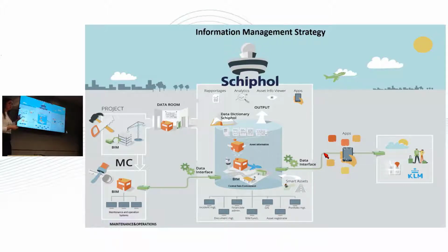And they are responsible for processing all of the information conform our data dictionary, where we have all of our data requirements, and they will send it to us through a data interface, and it will then land in our central data environment. This is all based on linked data. So I'll go through it step by step.